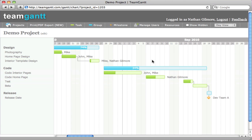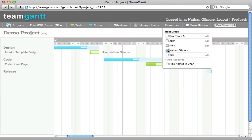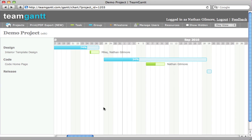Now one of the great things is you can come up to the resources menu item and select any name in the list. And that allows you to view just the tasks that that resource is associated to. This is very helpful when you're working on a large project with a lot of resources and a lot of tasks.